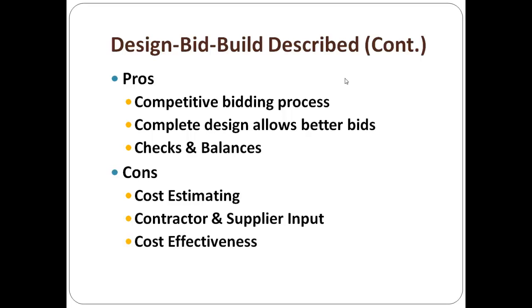Cost effectiveness, maximizing the effectiveness for money's sake, both for the cost of the building while you build it. But if you have looked at any charts, and in some of my other webinars I've shown this to you, in a 40-year life cycle of a building, the construction and the fees for design and construction that you pay the industry professionals are a small slice of the pie. The biggest slice of the pie is taken up with the life cycle, meaning the insurance, the custodial, the maintenance, repairs, and caring for the building over the next 40 years.